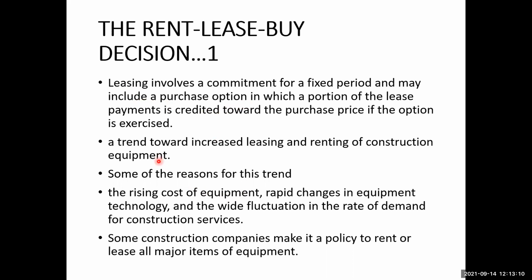Nowadays, there is a trend toward increased leasing and renting of construction equipment. Some of the reasons for this trend are that the cost of equipment is increasing day by day, so not every contractor is capable of buying and maintaining that equipment. Also, there are rapid changes in equipment technology. It means that once you buy equipment and don't use it sufficiently, new equipment will come which will be more efficient than your old equipment. Then your old equipment will not be very economical to use.